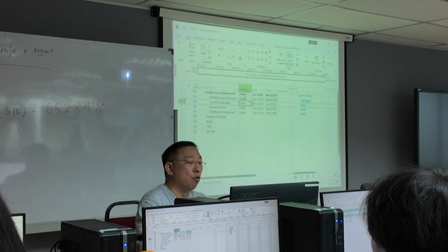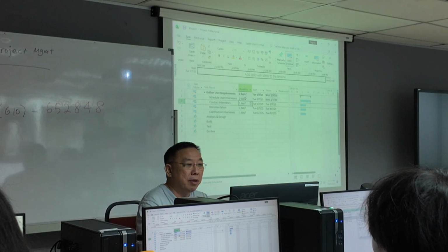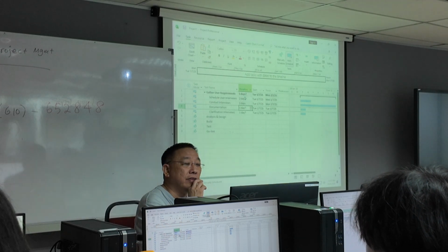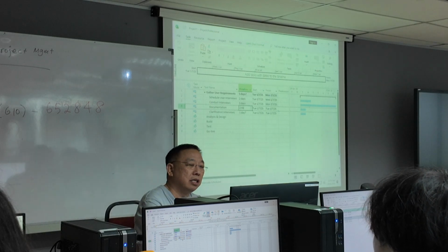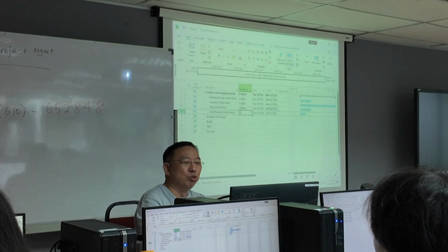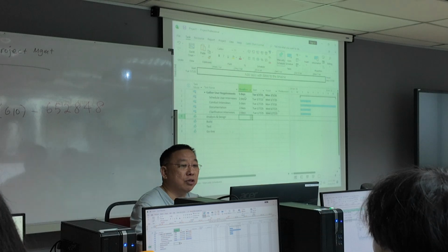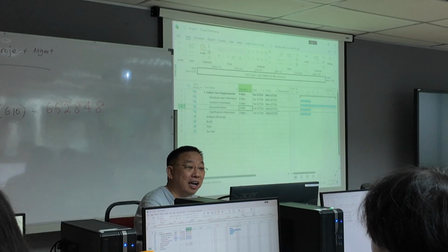So let's key in again and say 2 days. Conduct interviews. Wow, one business analyst, maybe I got to interview 10 users. So maybe I keep 5 days for that. I've been quite busy, right? Okay, 5 days. And documentation, I think I will need at least 2 days. Let's schedule 2 days first. And clarification interviews, just to be safe, I put 2 days as well, in case I got to do that. And once you've done that, you notice the Gantt chart changes. Let me put documentation 3 days so you can see a difference in the Gantt chart.